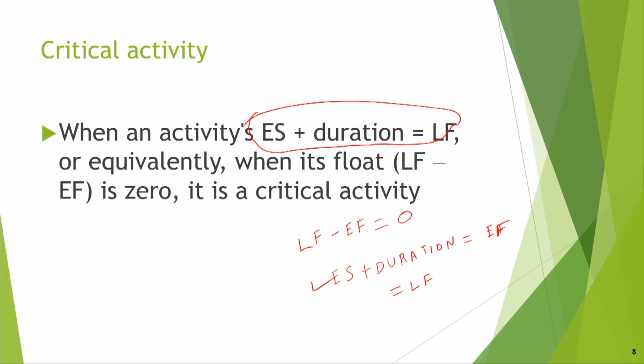Earliest start plus duration means earliest finish. So, there we define earliest start, earliest finish, latest start, latest finish. In fact, LF will be LS plus duration.